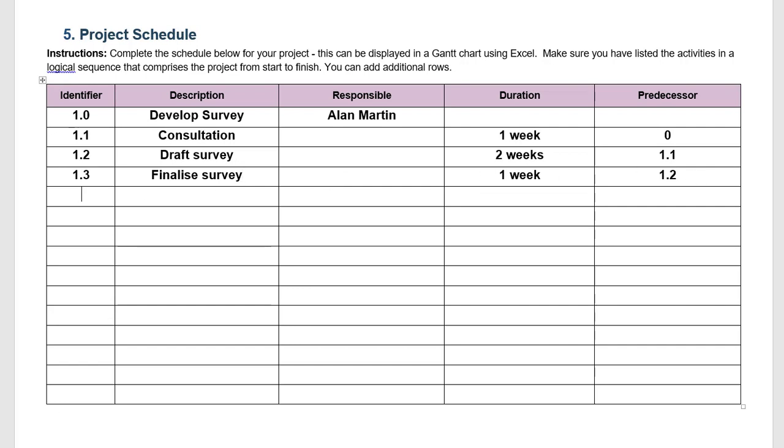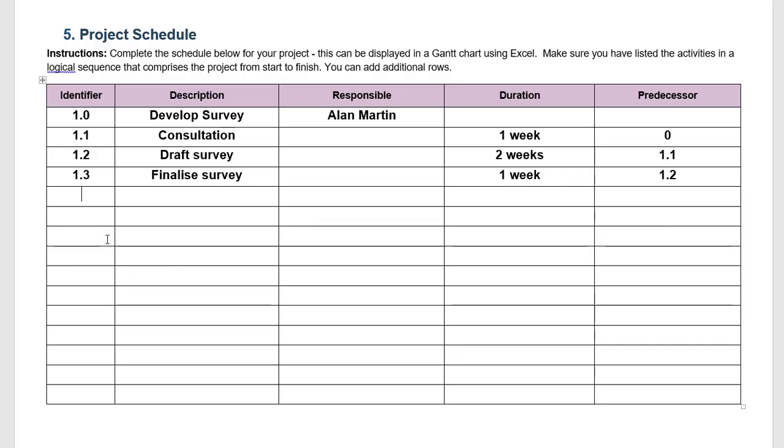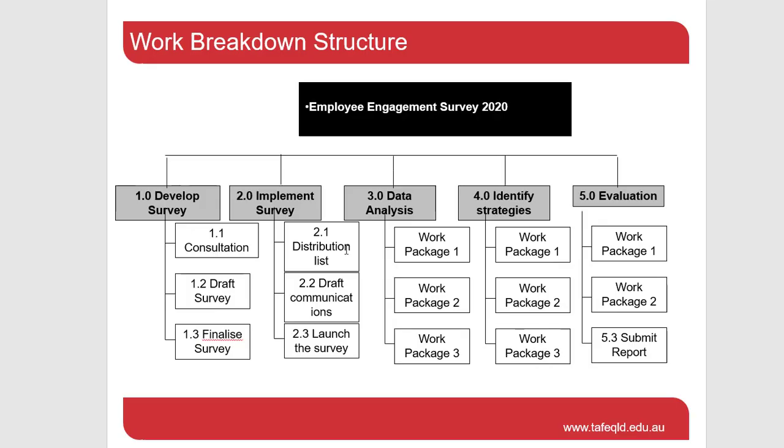Going back to our work breakdown structure, the next was to implement the survey 2.0. So here we have 2.0 implement survey. So here we have three items of work. First is to determine the distribution list, make sure all the email addresses and so forth are correct. Then we draft communications to employees which will be asking them to complete the survey with a deadline, what the survey is about and so forth. And then finally we actually launch the survey, we hit the go button and deliver it to all of the employees asking them to complete it.